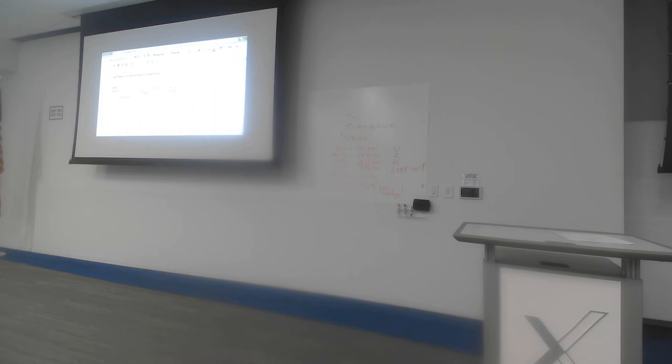So on my second table here, which has to do with costs, I'm going to crash activity I. Because it's on the critical path, it's going to bring down the overall project duration by 1 day, which will bring it down to 19. The activity crashed is I.